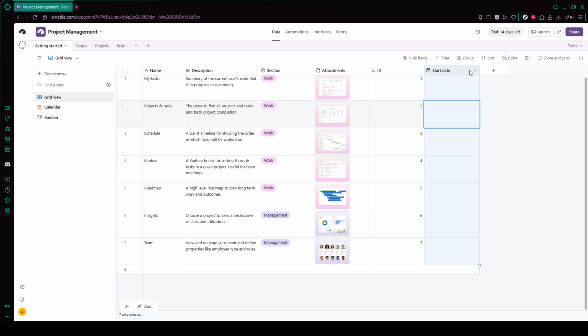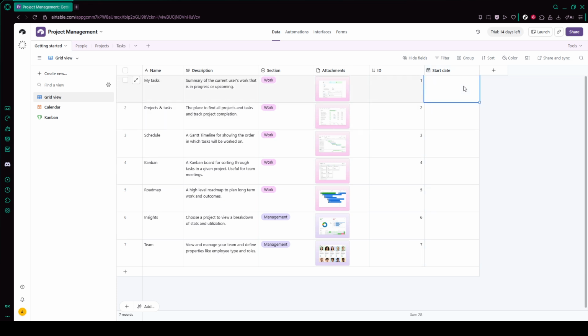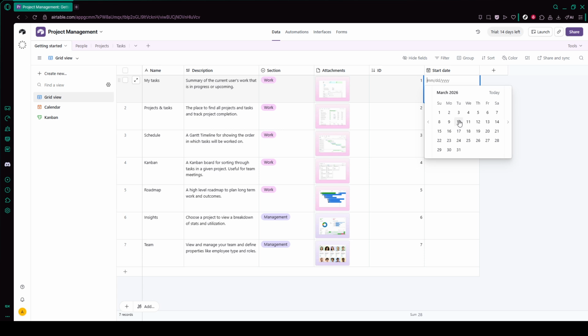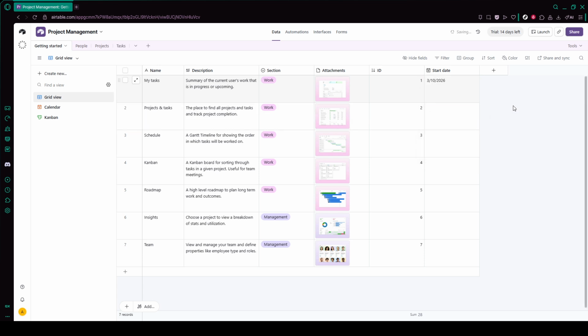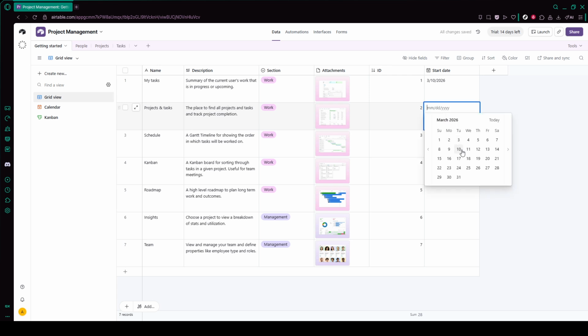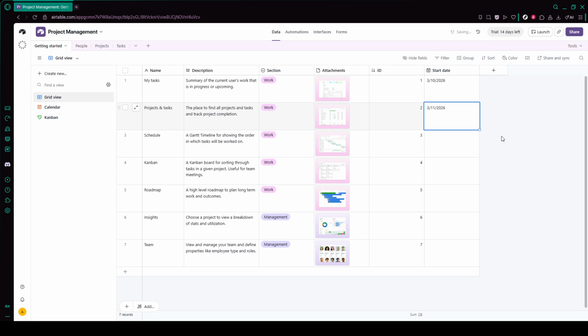Now start entering your tasks. Each row or record in the table represents a single task. Type the task name, select the right status and assignee, set its priority, and assign start and due dates. Fill in any notes that would be helpful, like links, descriptions, or brief instructions. Take a little extra time here to be thorough. Well-structured data will make the rest of the workflow much smoother.